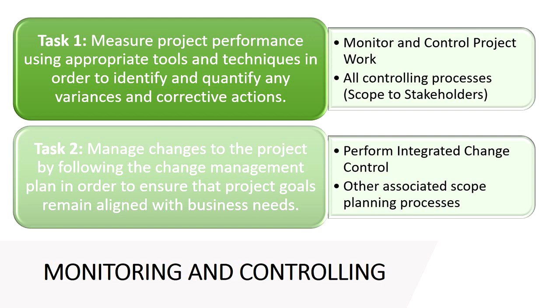That change request, now called an approved change request, gets funneled back into direct and managed project work, gets funneled back into control quality. And then what do we get? We get a revised deliverable from direct and managed project work. That goes to control quality as well, already with the approved change request as one of the inputs, because we're going to do an approved change request review of sorts, which again is buried in the 6th edition.